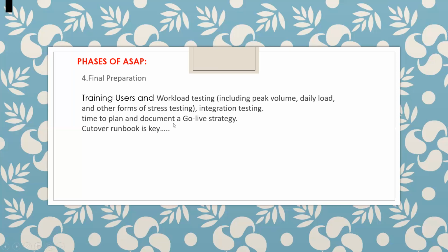This is one thing. You have a go live strategy. One document will be there, like at what time exactly we have to live the system. There are a few things before going live. Sanity testing, like whether all configurations are moved or not. Integration testing, interface testing, everything will be done. That's why, if the customer gives one Sunday, it means that people will work the total Sunday night. This is what happens.